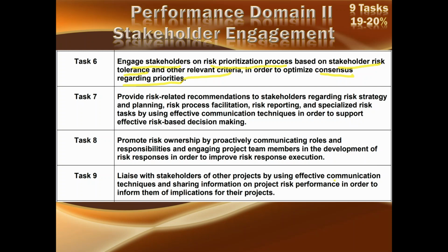If the stakeholder is not going to pay for that, then how can I take that risk? Therefore, I have to get the stakeholder on board, engage him, and involve him in the risk prioritization process and establish a consensus on what can be borne and what cannot be borne. So again, in task 6, you can see there are a number of items underlined, and we can have a number of questions coming out of these.